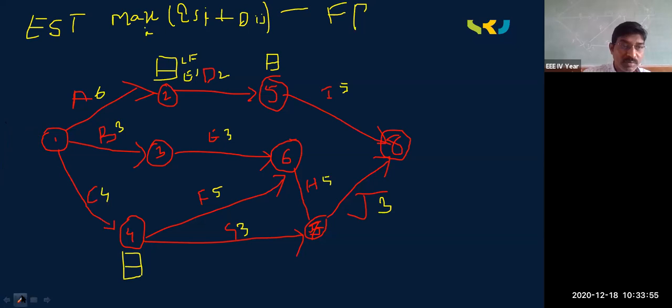Right. So now up to here it is okay. Now we need to calculate the earliest starting time. Friends, I have said many times, the earliest starting of the first node is always what? 0. So please remember, friends, the earliest starting point of an activity, a node, is nothing but 0. Now you got the point. The earliest starting time of the first node is always 0, meaning the starting point is always 0. When you count, we start from 0: 0, 1, 2, 3, 4, 5. Like that, the earliest starting point always has a 0 value.